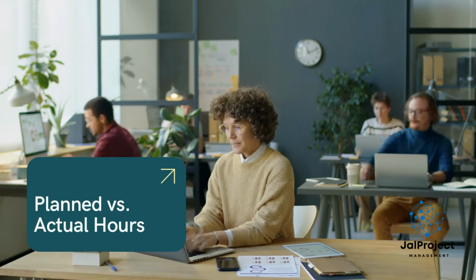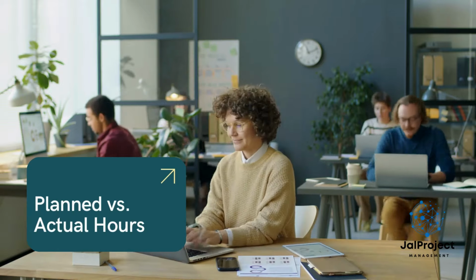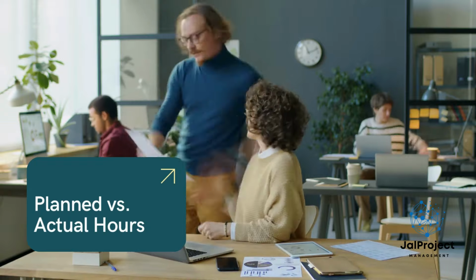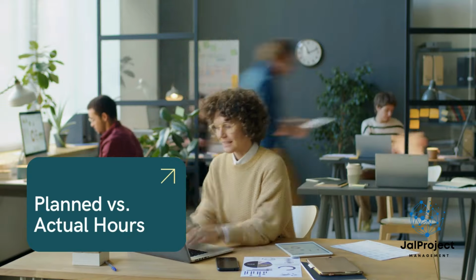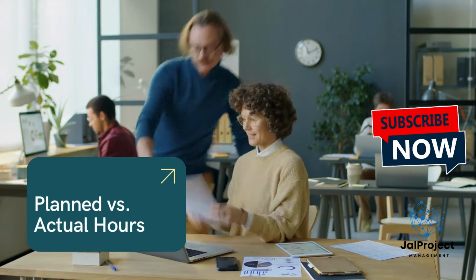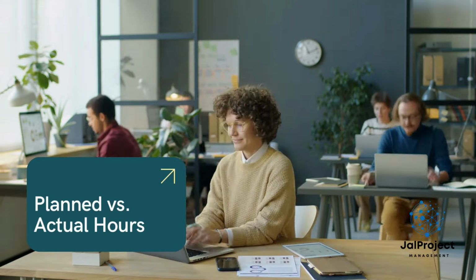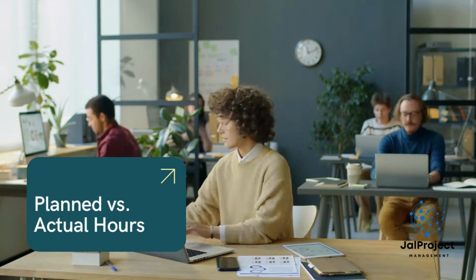The value of this KPI lies in its ability to highlight discrepancies in time management, allowing project managers to make informed decisions about resource allocation, schedule adjustments, and efficiency improvements. For example, if a task consistently takes more time than planned, it might indicate a need for better training, more resources, or a revision of the task complexity.